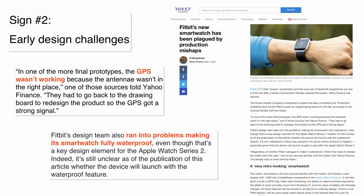Waterproofing is a common problem that we see that a lot of companies run into that often delay projects in trying to get, particularly in a prototype format, a fully waterproof design. It often takes more resources, frankly, than a lot of companies are willing to invest in the prototyping phase. But what you're going to find is that you will likely run into waterproofing challenges down the road at some point. So it's better to get it done in the prototyping process and understand exactly how that device is going to get waterproofed before you get too far down the design path.